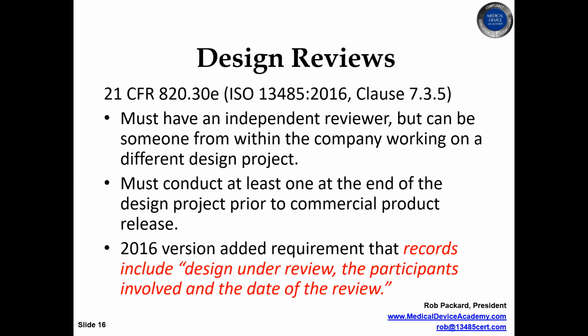You might want to test whether your plastics are compatible with the sterilization process early. You might want to test your circuits to make sure your battery supply is large enough to power that circuit early. So anything that's a long lead time item, it might change things dramatically. You want to do those earlier than later.